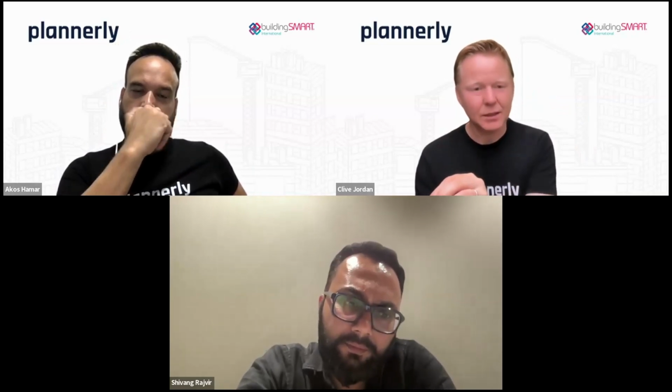So my statement would be two parts. One, the owner needs to define their exchange information requirements in a much more clear and defined way that connects to their overall operational goals. And then on the other side of it, to have a consolidated, collaborative, continually live and improving BIM execution plan that is also archived at every single new appointment and as part of their contract, and even developed and re-upped into their contract if certain things change in respect to process or something that needs to be contractually obligated.